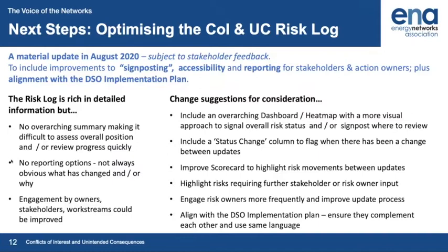So we've come up with a few suggestions for your consideration, and subject to stakeholders thinking these are reasonably good ideas, these are some of the things we're considering. Unsurprisingly, given what I've just said, including some kind of overarching dashboard or heat map, a more visual interpretation of whether things are improving or not, and if they're not, where to focus. Adding simple things like a status column, so you can quickly see where something's changed or there's a new risk that you may want to review.